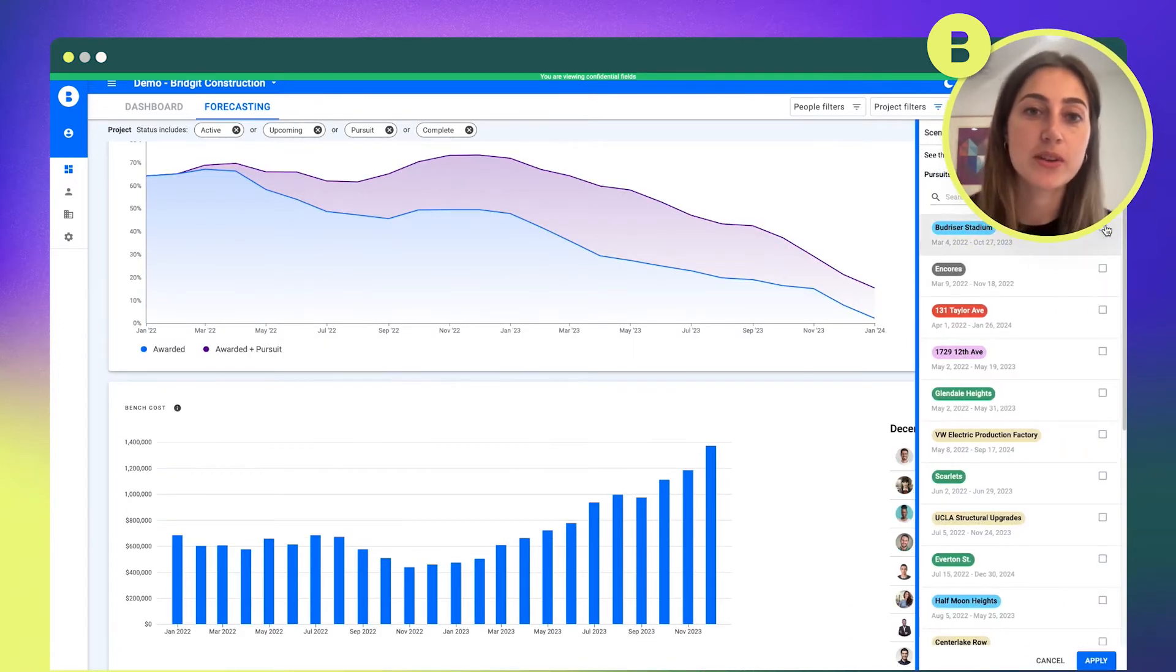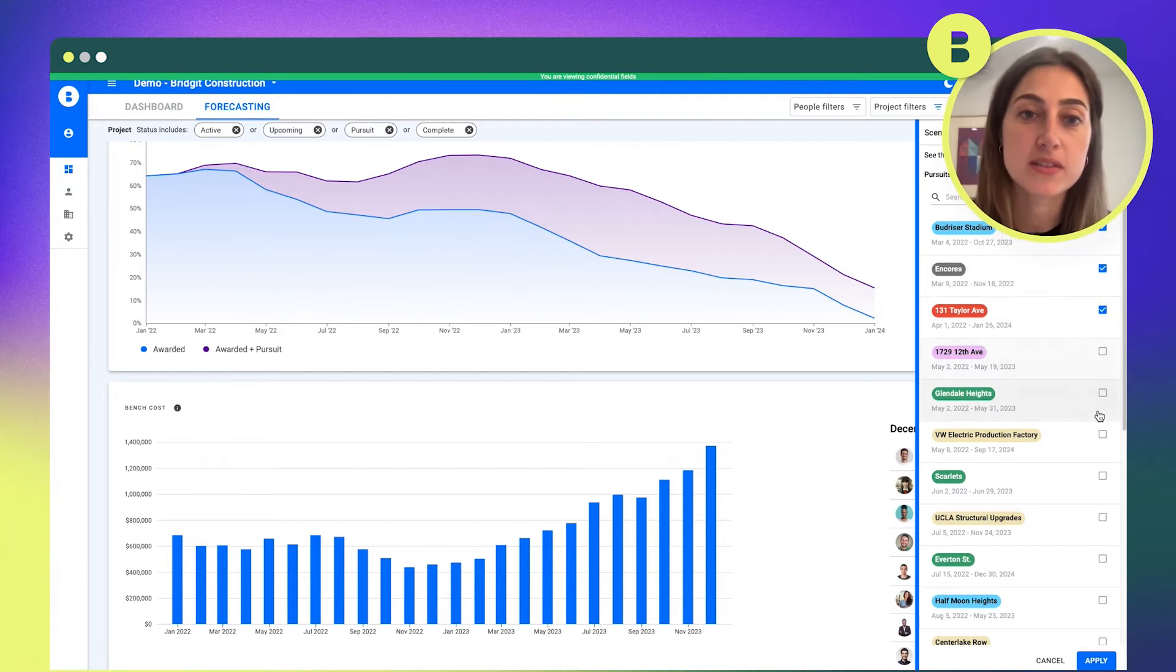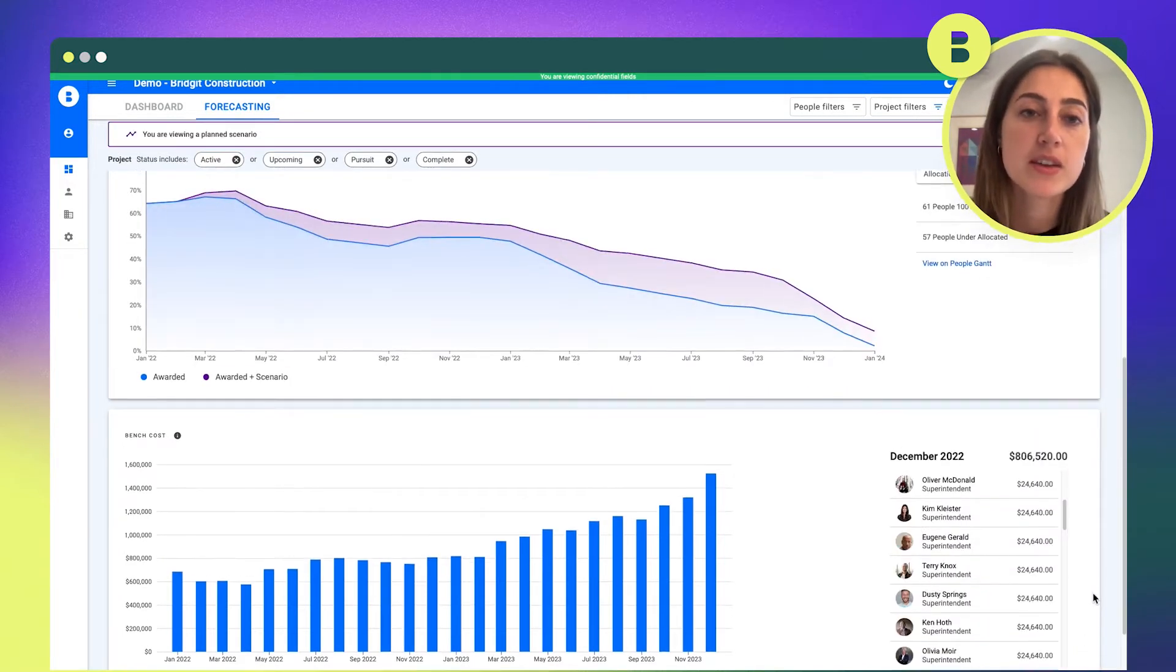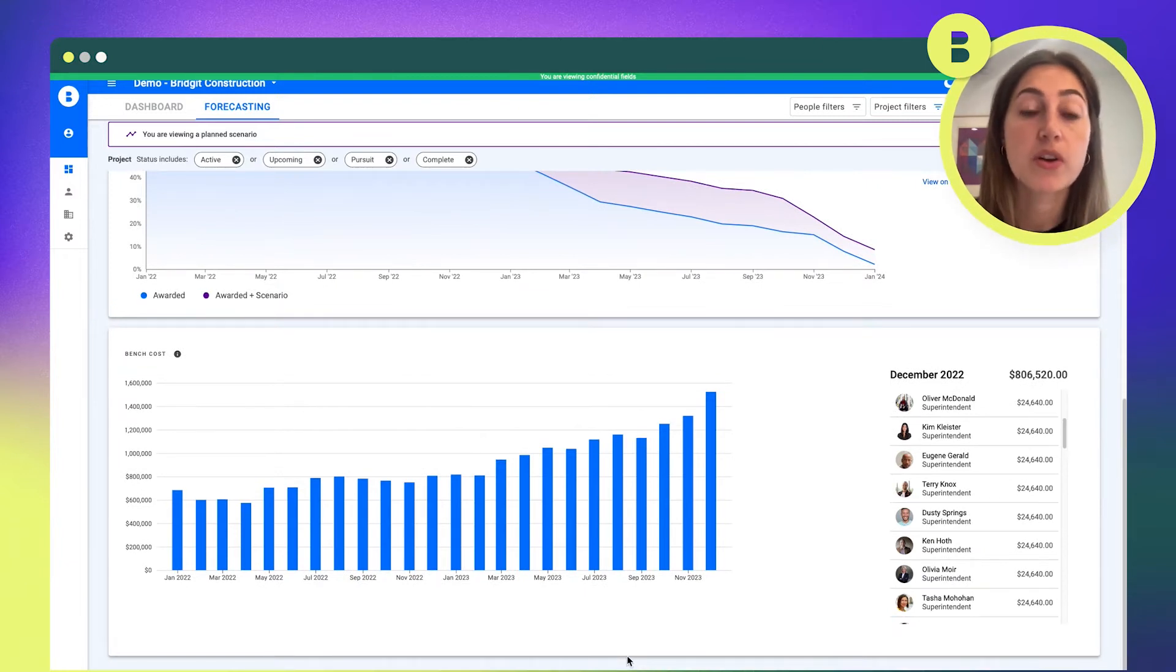Bench Cost is simply the calculation of what is your staff that is not utilized, not assigned to projects, and what is the cost of that staff. So you can get a sense across your portfolio what the cost of having those team members not being assigned and not being billed to projects.